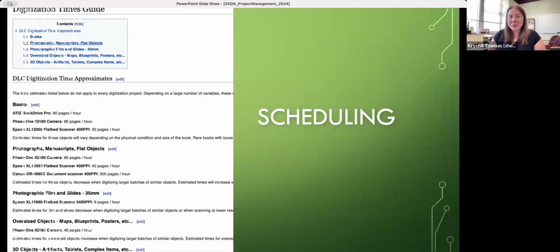So a 15-minute estimate per item usually gives us a rough general ballpark for the total amount of time it will take to describe a project.